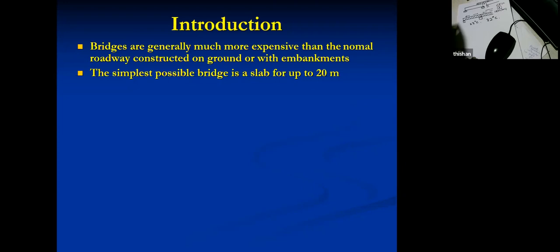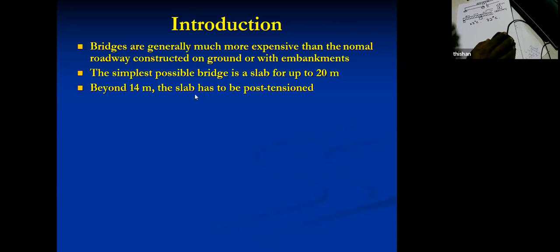But if the road is wide, having like 6 lanes, then the cost can be even higher. But the cost has to be at least 6 to 10 billion rupees. Whereas if you are going to do it on an embankment, it can be something like 3 to 6 billion rupees, or slightly more if you encounter very weak soil conditions where a lot of soil improvement has to be done. Then it can go up slightly. So those are just numbers, just for information.